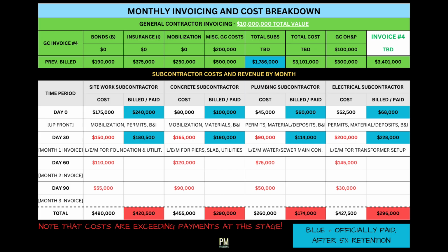So in short, the payments subcontractors receive often lag 60 days behind the end of the month in which they invoiced the work. So if they submitted their first invoice at the end of October, they may not be paid for that work until the end of December. It might be sooner than that, but it would not be uncommon for it to be 60 days. But as we said in section 1 and 2, subcontractors may have received some payments before work begins, but that only covers so much.